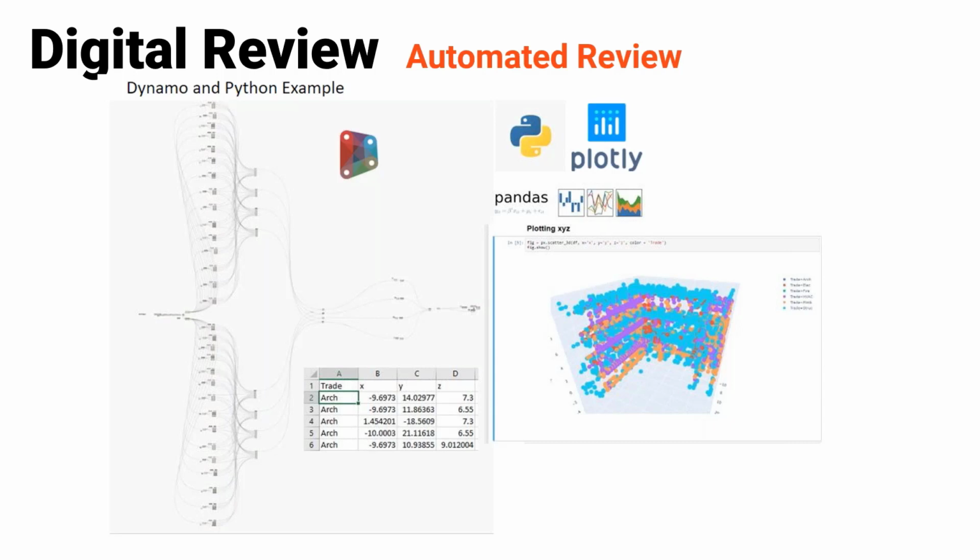But then it'll run a Dynamo script that'll open that file and run the clashes and group those together into manageable issues lists. And what he's also doing is saving out point data of where these things are clashing. So all of this is possible because we can just have Navisworks running on the project on a weekly basis, and it's just available. So our teams, instead of not doing clash detection because it's hard, are able to just jump in and see this.